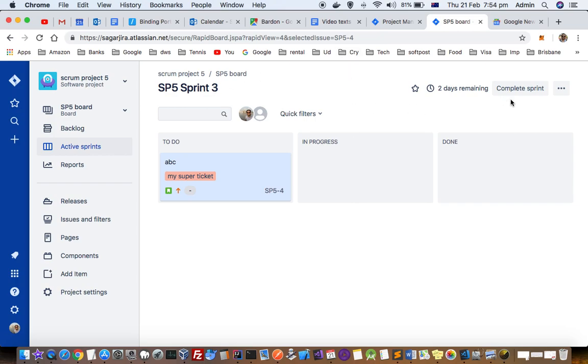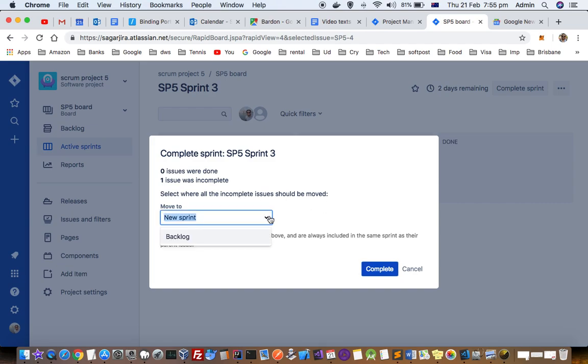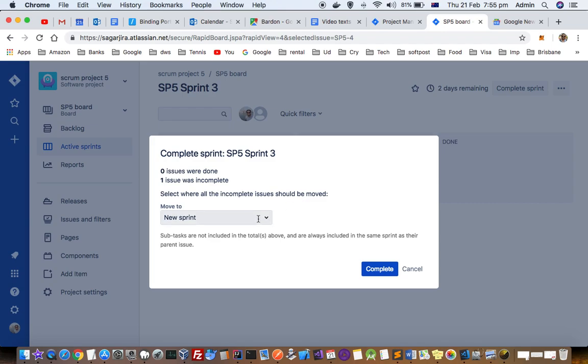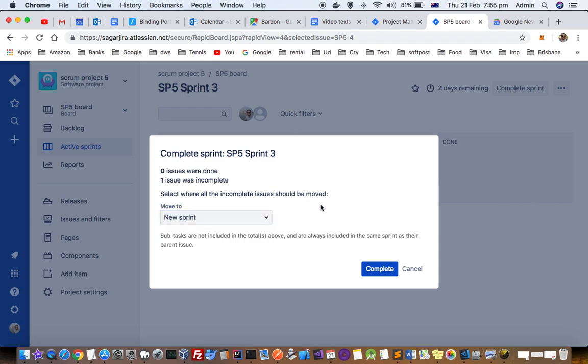It is saying that one issue was incomplete. Where should all incomplete issues be moved? Here you can select backlog or new sprint, and then click on complete.